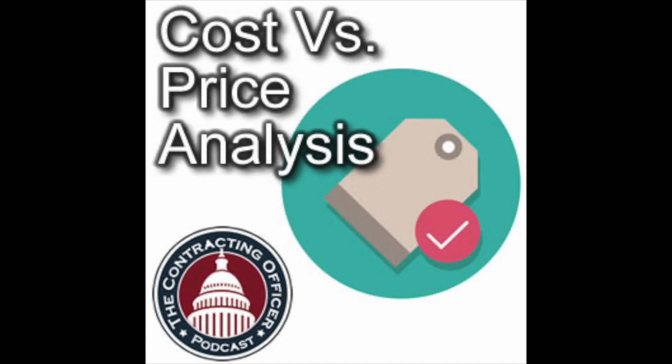Give me 3 months worth of work and give me a study on how you would do this. I had done the analysis myself on 3 months worth of work for this many people, using my best engineers and smart people on the government side to say it should take about this much work. I determined that it should cost about $500,000. I told these 4 offerors, give me a $500,000 firm fixed price proposal to do this study.